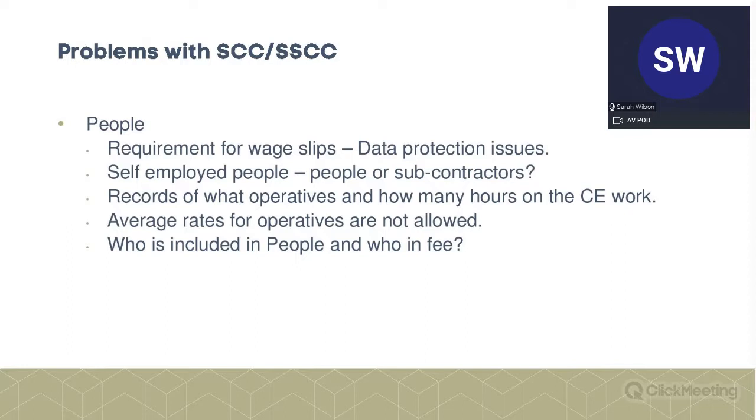It's for individuals, remember. So there's a requirement for pay slips, which is not particularly attractive for data protection issues. It's still compliant because you have a reason for disclosing pay slips, but people are fairly sensitive about that. So what I would say is, if you have the chance, put rates in, but just be really careful about putting rates in. But it avoids this sort of requirement to provide all this information.